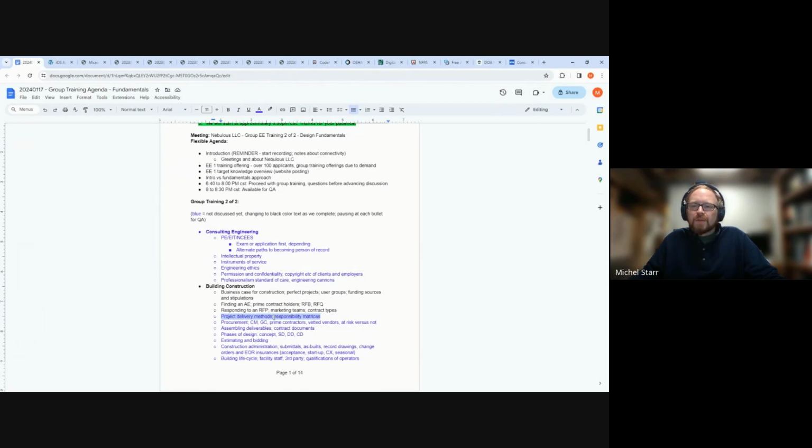So as you're working with the architect or engineer, if the owner has lots of ideas and wants to consider them, and also they just want the best, they might, at least in this environment right now, or in most recent years, find an integrated type delivery method where they might have a construction manager who's at risk or not at risk, who can bid or not bid the project. But the benefits that come from this is you have probably vetted contractors.